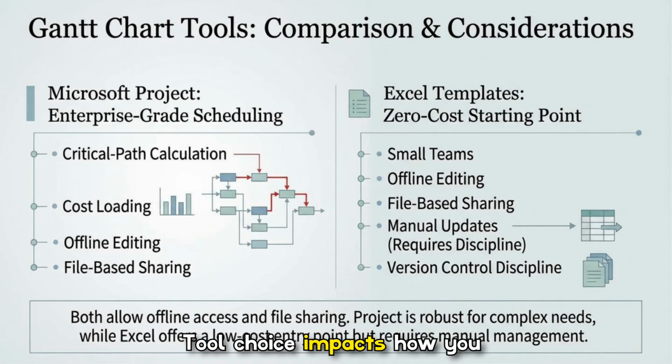Tool choice impacts how you manage schedules. Enterprise-grade software offers critical path calculation, cost loading, and robust scheduling for complex programs, while Excel templates provide a zero-cost starting point for small teams, but demand manual updates and version discipline. Both approaches can support offline editing and file sharing, so align your tool with team size, complexity, and governance requirements.